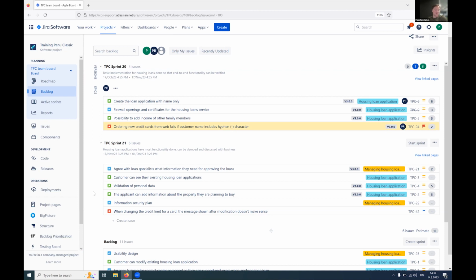Again, the same applies for those as for everything else. Try to avoid having really small and tiny items which are for only one individual developer. Rather consider what the real value is that we are getting out of this. Is it, for example, improving the stability of our system? Then create a task out of that, maybe create some subtasks underneath it, and combine some small things into one instead of handling them as separate items on the backlog.